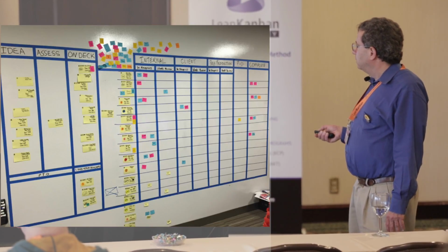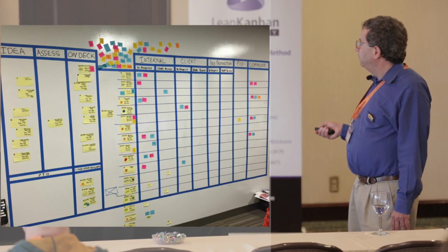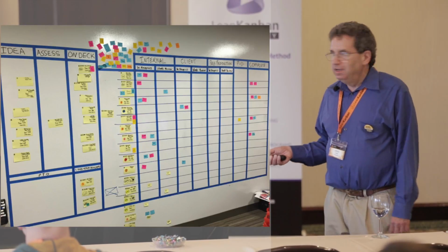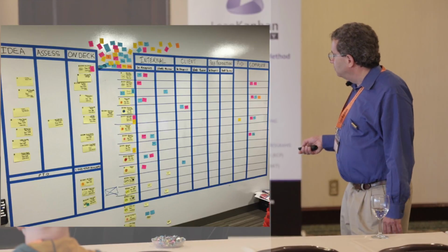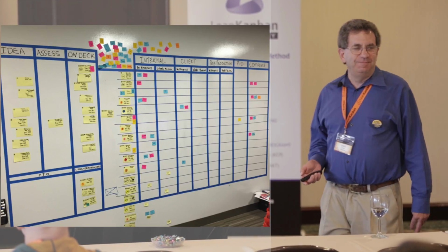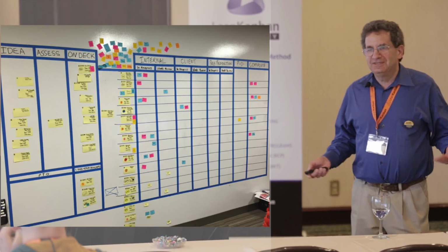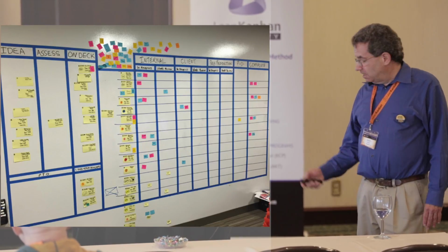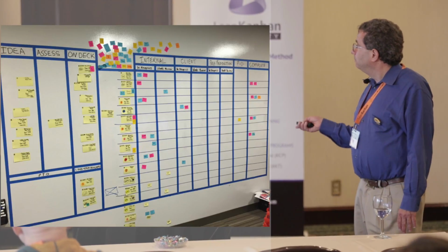And originally the thought was, well, we could just limit WIP by the number of swim lanes, because if you ran out of swim lanes, you couldn't do any more work. But the team was too smart and they cheated and they found ways to break the WIP limits. But it was a first attempt, a little better than Proto Kanban, but not everything we needed.